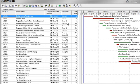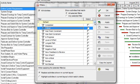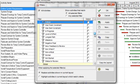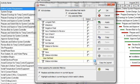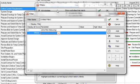Now we are going to create a new user-defined filter for all activities that will start within the next month. This filter is commonly called the One Month Look Ahead. Click on the filter menu button, highlight User Defined Filters, and click on New. The filter dialog box appears. In the filter name box, type One Month Look Ahead.